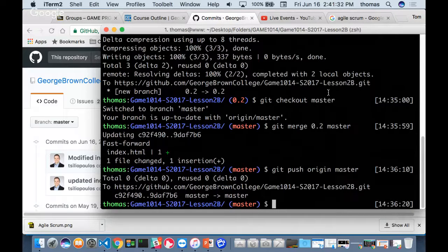My recommendation is you do at least 3. 3 iterations, 3 builds for each of your releases. If you haven't got 3 builds for your alpha yet, or if you're not there, you're behind, right? Because it means you haven't had enough features and you haven't separated those features enough. And you're actually increasing the risk of your project having a bug, or having an unrecoverable broken build. Once you get there, there's nothing I can do to save you, right?